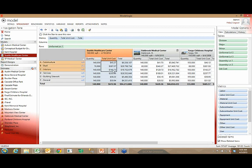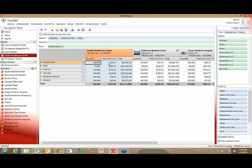When I look at these unit prices, these would be the average unit prices across my model. When I take my proposed quantities, multiply it by the average unit price, of course, I come up with a budget. When I look over here, you'll notice that most of my unit prices are being driven off of the proposed size of this project.